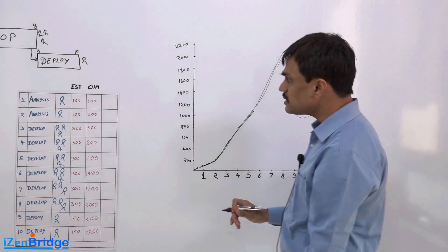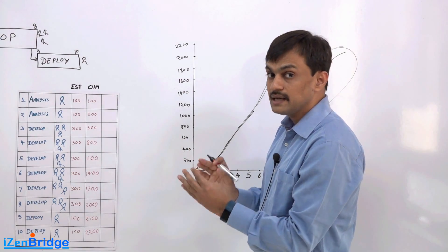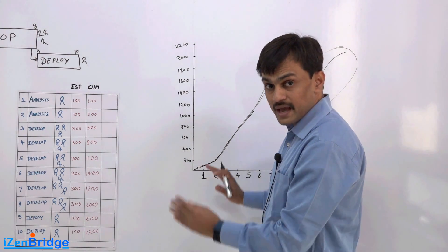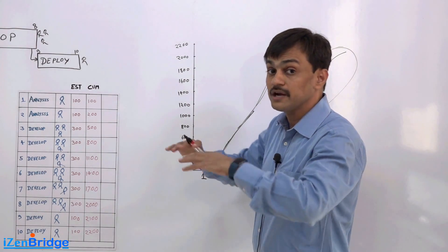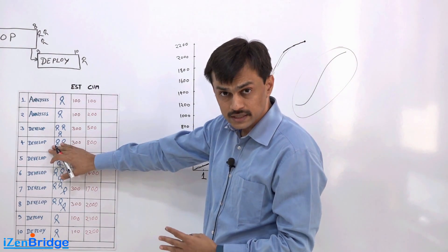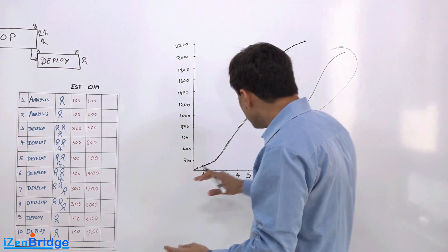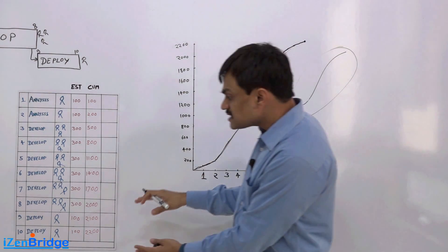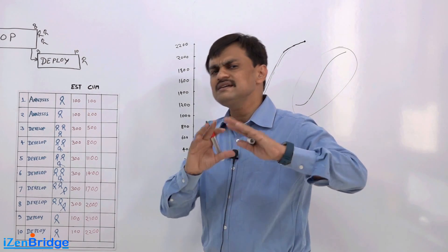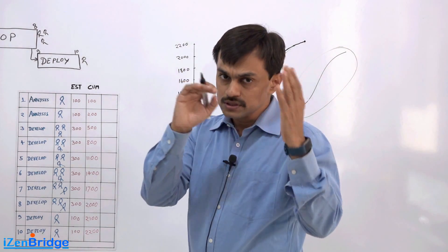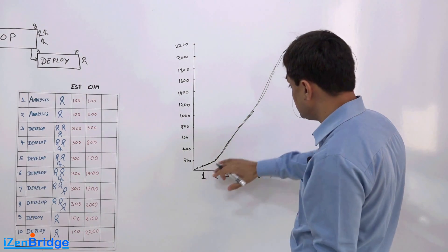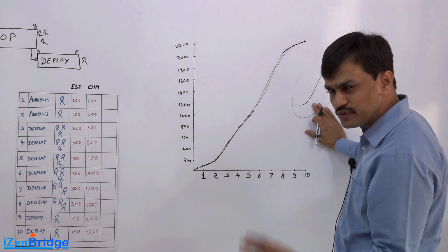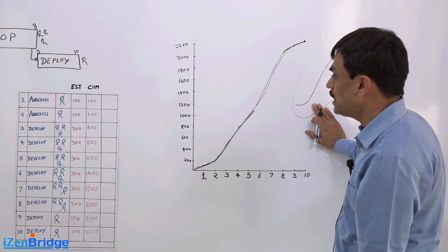The idea here is initially we might be involving less number of people and that is why in the initial duration of a project we may spend less money. As we get into execution we are expected to spend lots of money because more and more people start working on it and they are spending $300 every day. Our curve goes steep in between but as we reach towards the end again it is expected to have less number of people working on it because it is just deployment. The main work is already done and the curve goes down and that is the kind of mark we see in our S curve. This is how our cost estimations are going against the time.